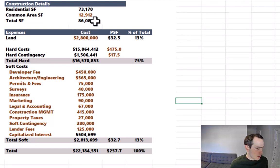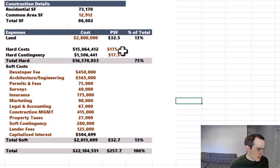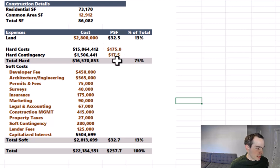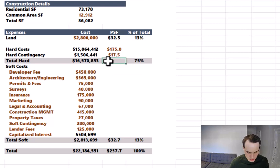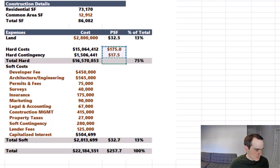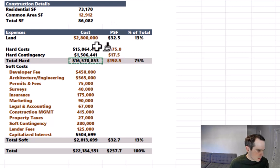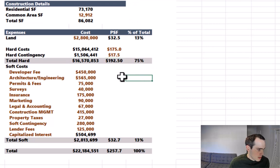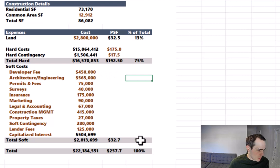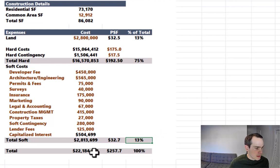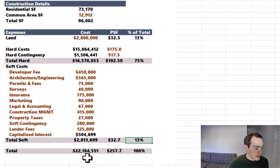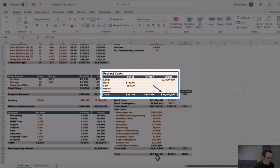We start with the square footage summary on the top. We have our land cost at $2.8 million, the hard costs on a per square foot basis $175 plus a 10% contingency, which equates to a $17.50 contingency. We can actually sum that below, make that black text, add a few decimal places. And then our soft costs are summarized below that equate for 13% of the total construction cost. So total, we're coming in at $22 million in total construction costs, which is actually very close to what we had initially projected in our back of the napkin multifamily development template.